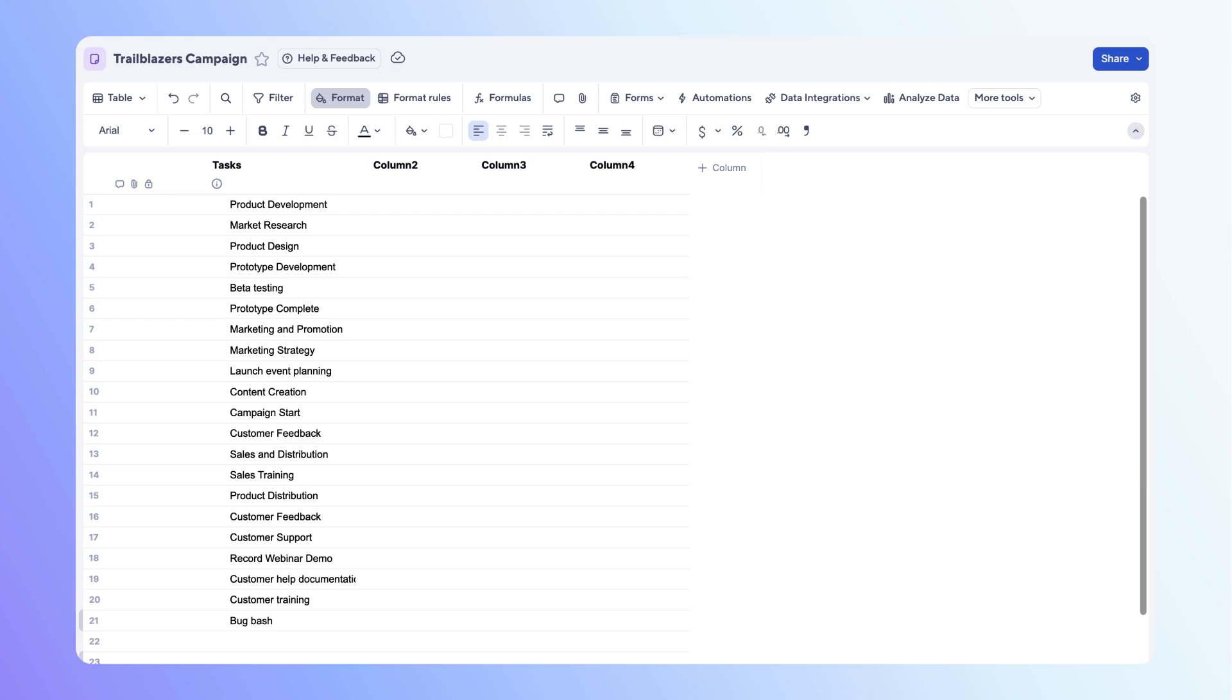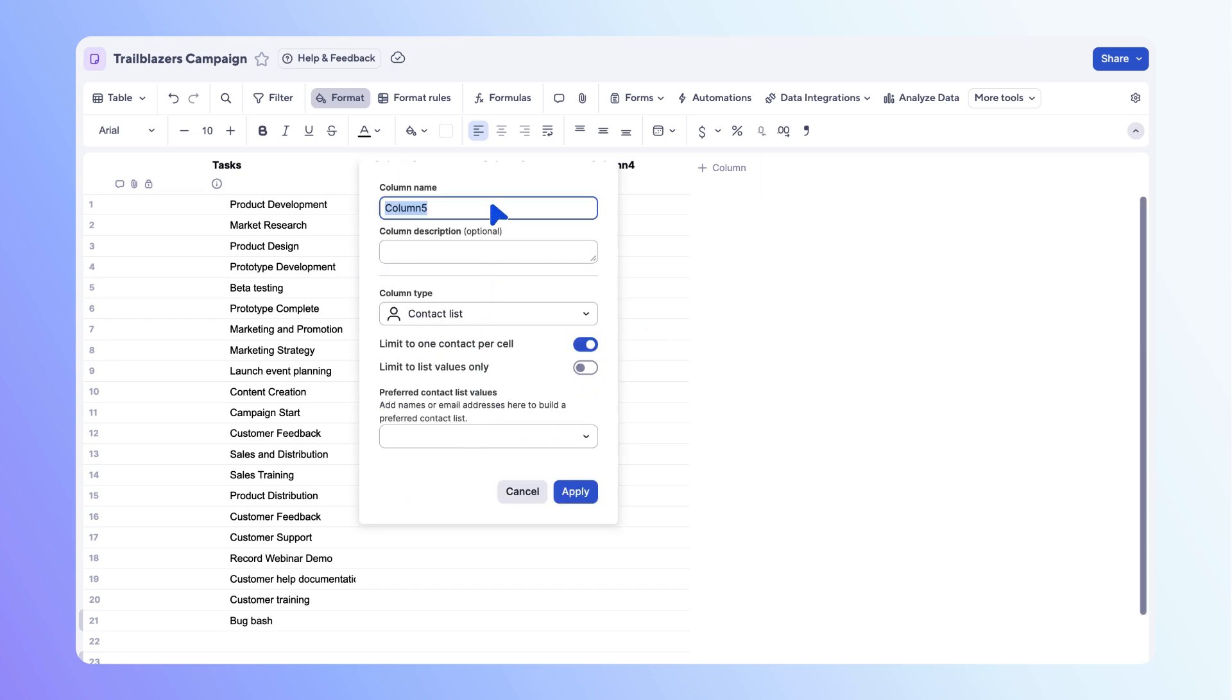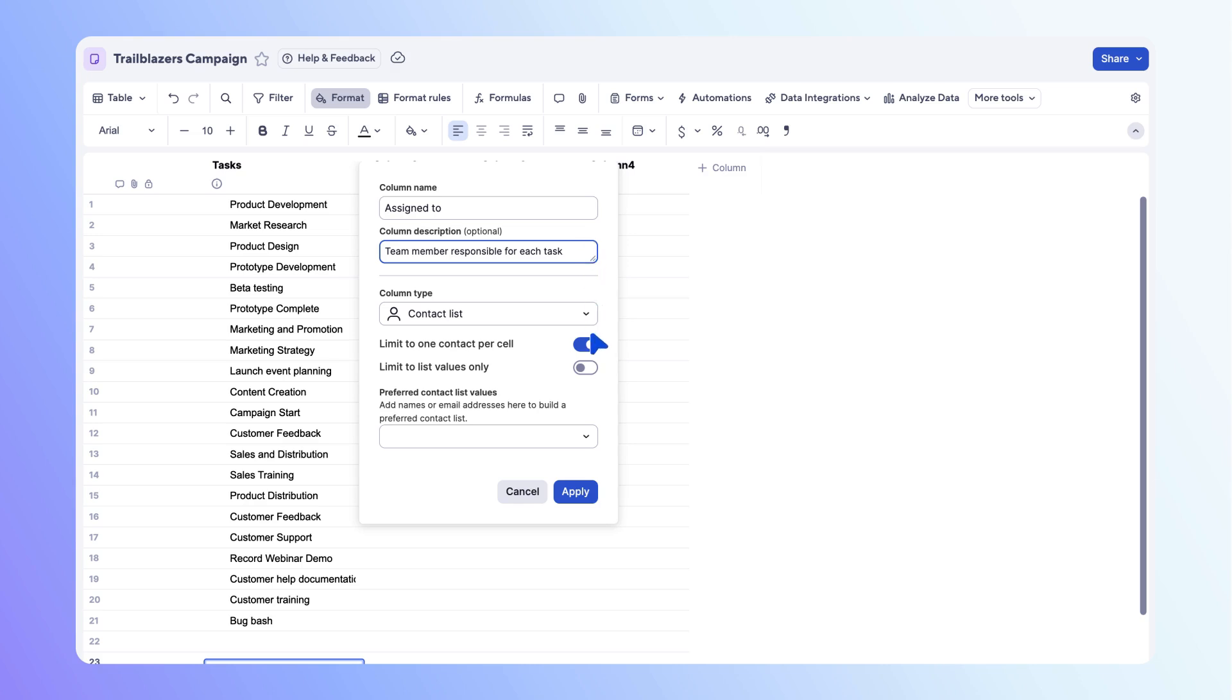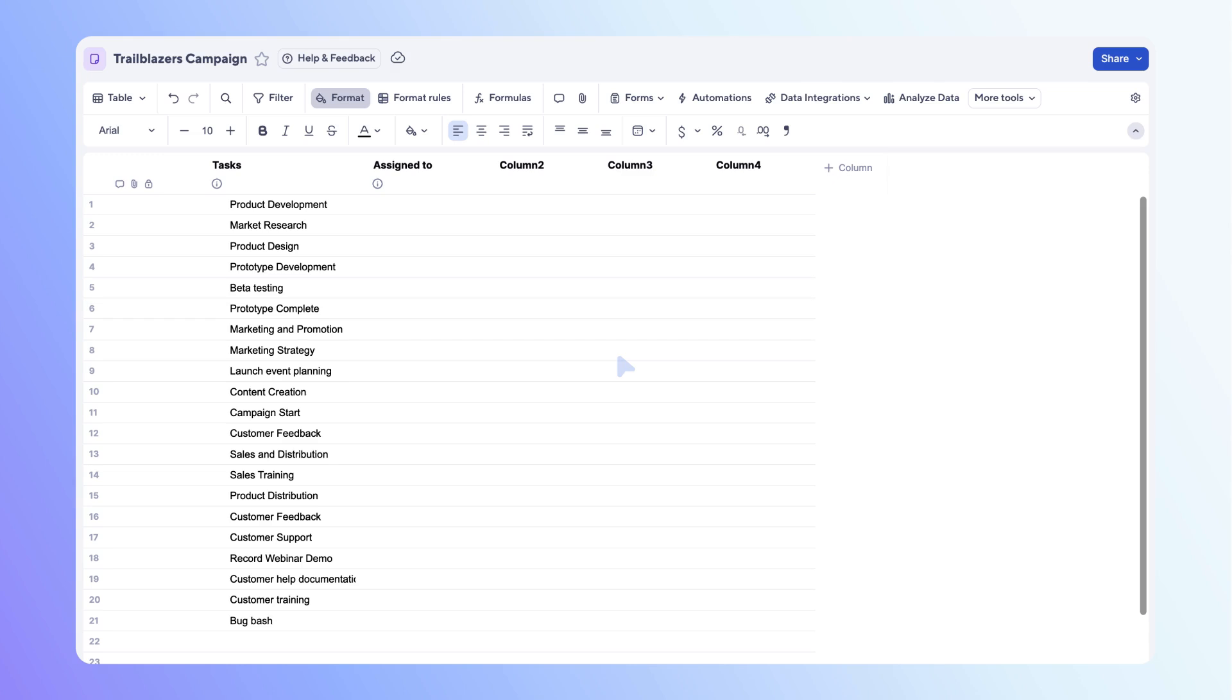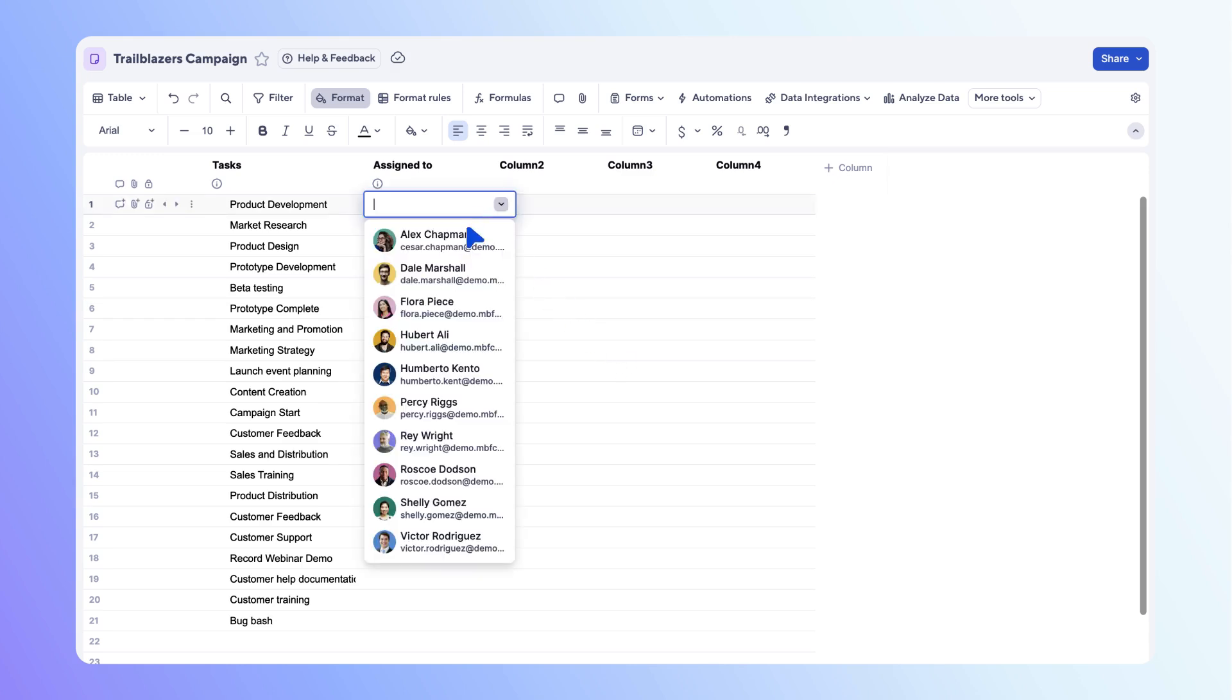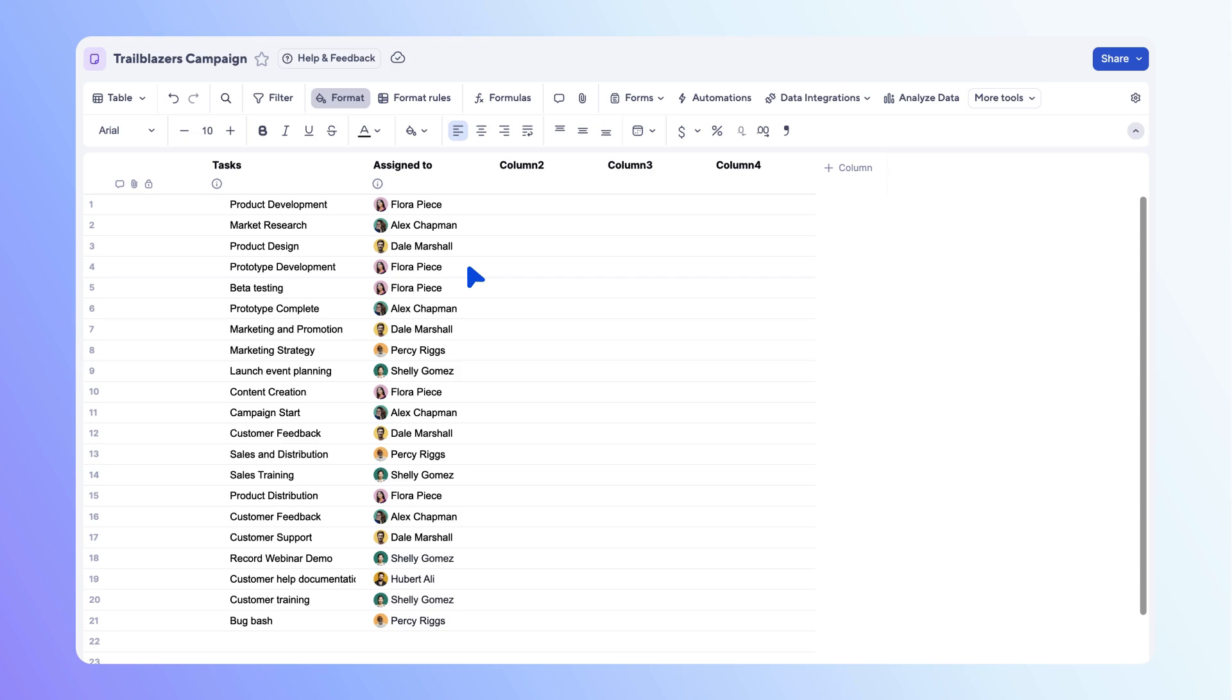Next, let's add key task info. Start with a contact column to assign work. Hover your mouse between columns, then select the add column shortcut. Since we want to assign each task to a team member, select contact list. Name the column assigned to. Next, you can add a description to clarify the column's purpose. Restrict entries to your set contacts by toggling on limit to list values only. Now let's add the team members. After you choose the contacts, select apply. Then you can assign tasks to the contacts in your column. Add the remaining task assignments.